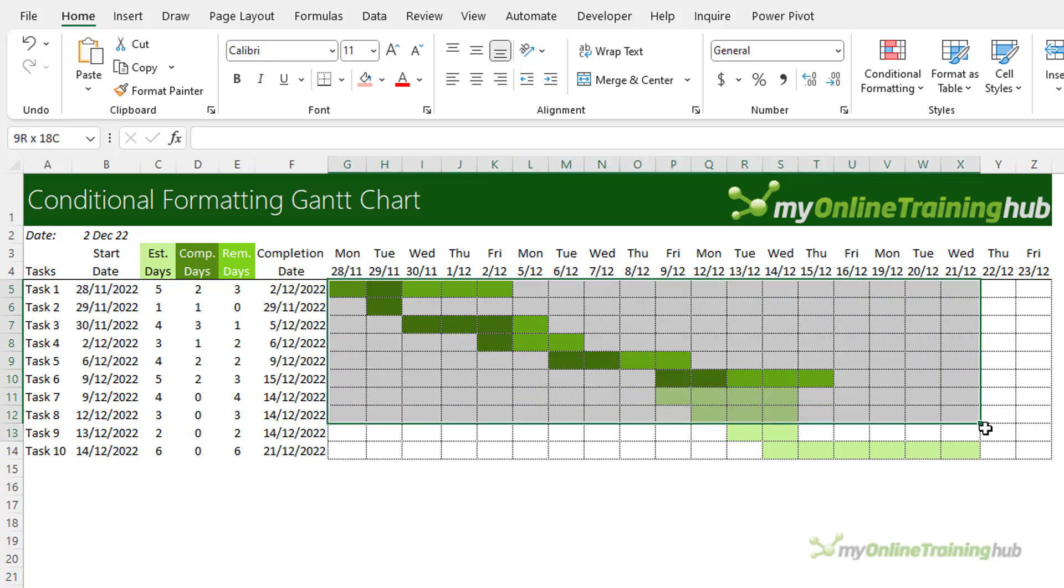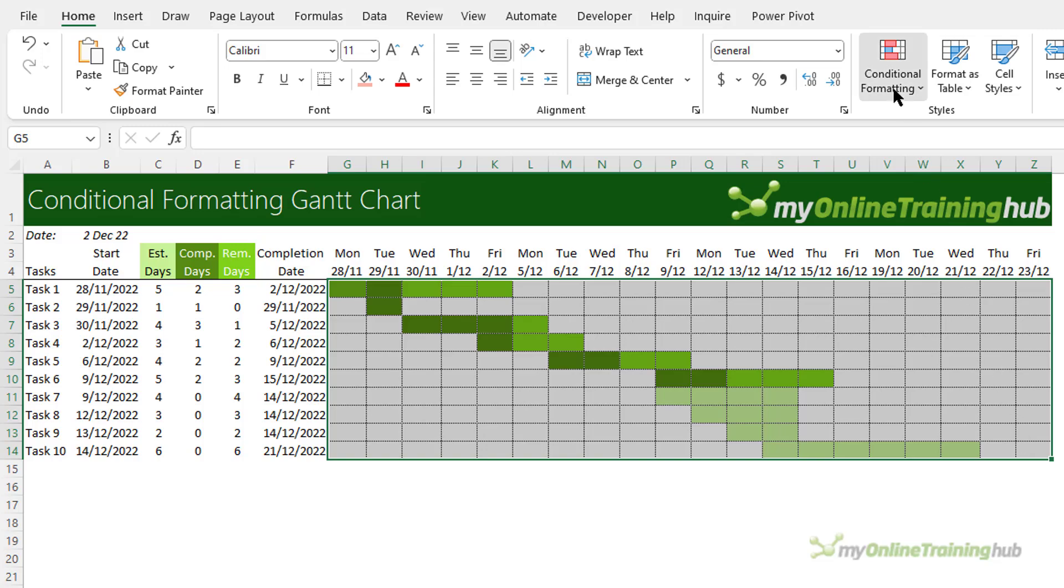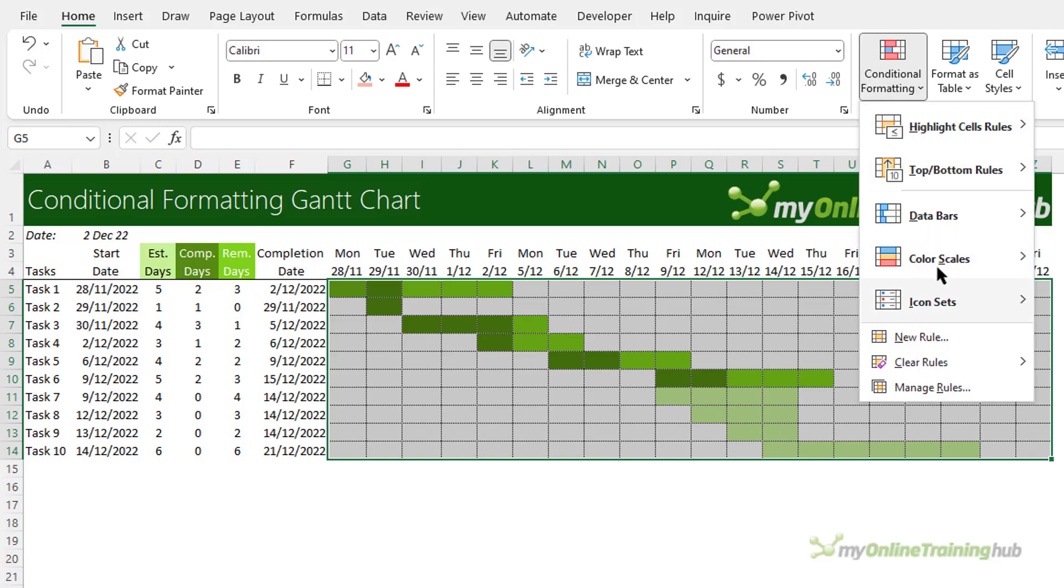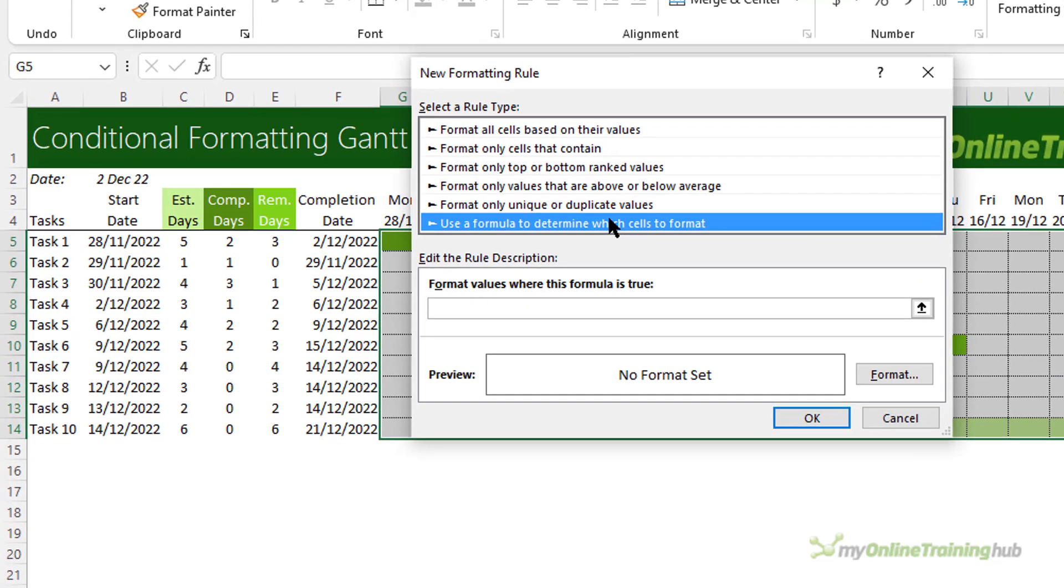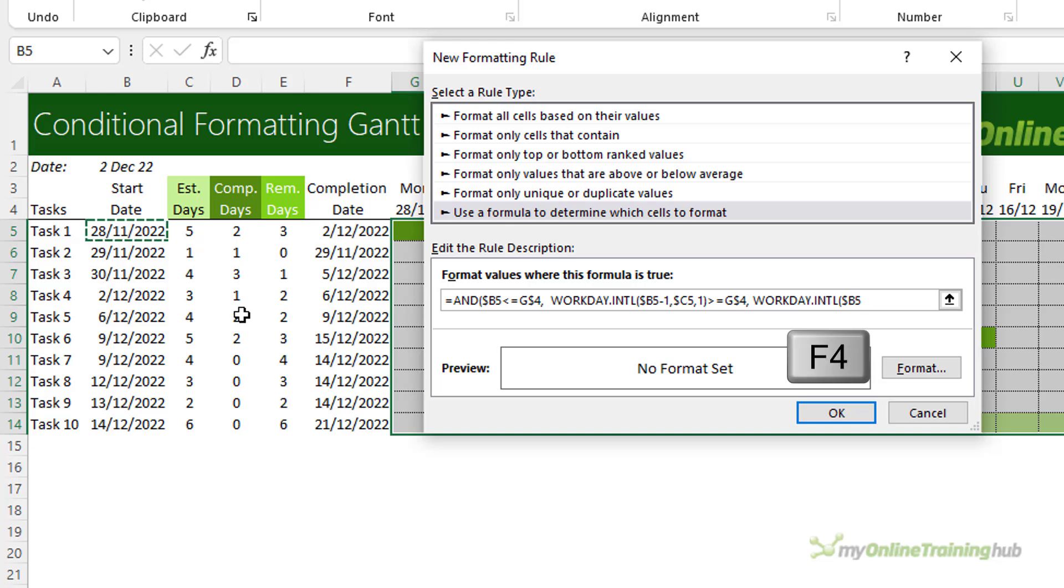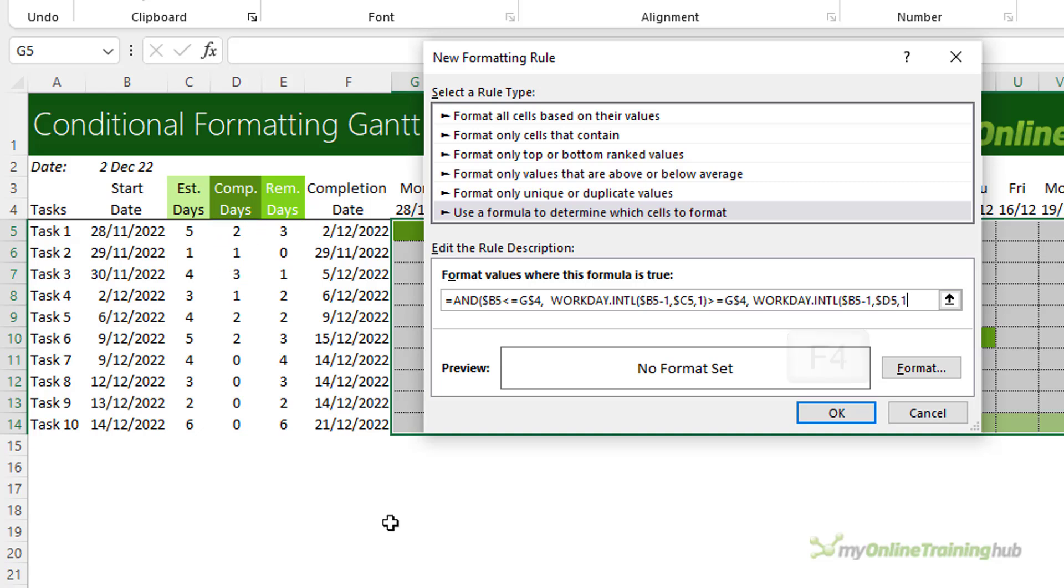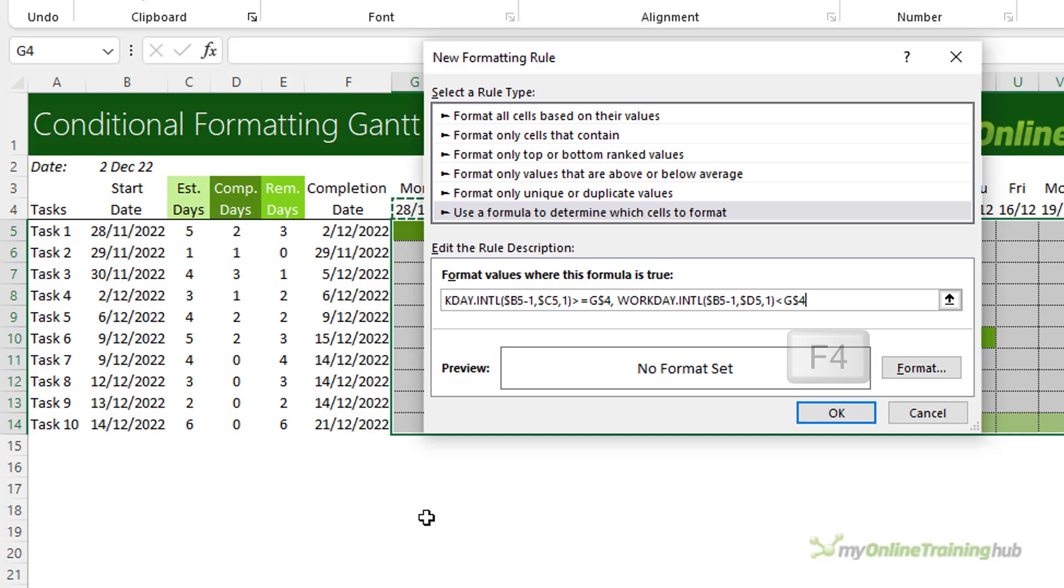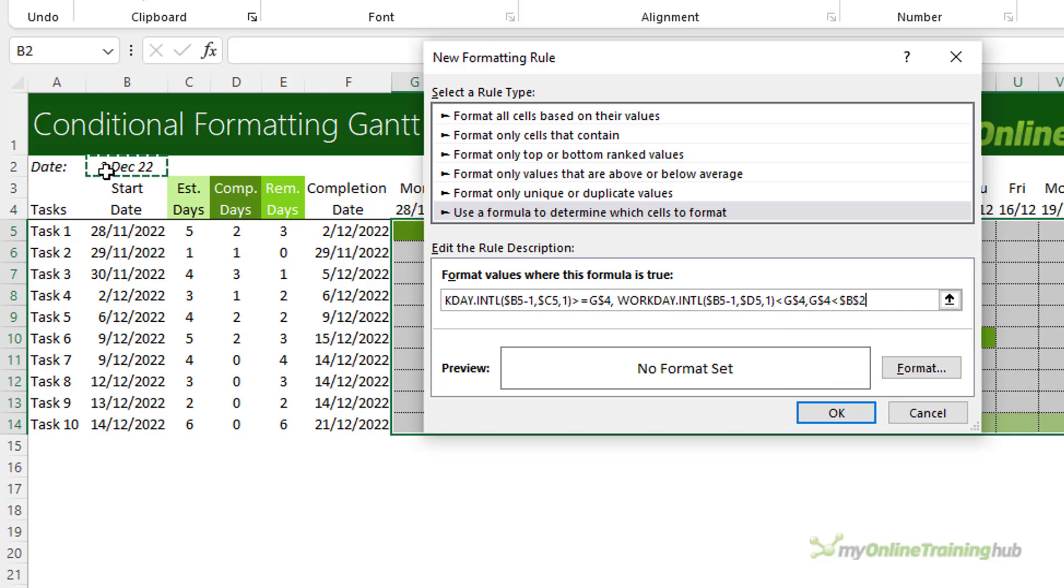So New Rule using a formula. Now the beginning is the same. So I'm just going to paste that in. And next I need to check if the dates completed so far are less than the current column. So we use the WORKDAY.INTL function for that. And I'm starting with the start date, F4 to absolute just the column, minus one, plus the days completed so far. And my weekends are type one. We're checking whether this is less than the current column, F4 just to absolute the row. And then I've got one more check.